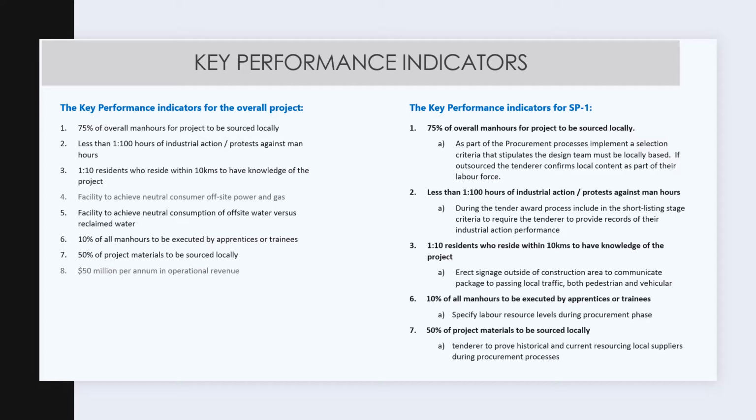We need to specify labour resource levels during the procurement phase also. And 50% of the project materials to be sourced locally. Tenderers to provide historical and current resourcing of local suppliers during procurement processes.